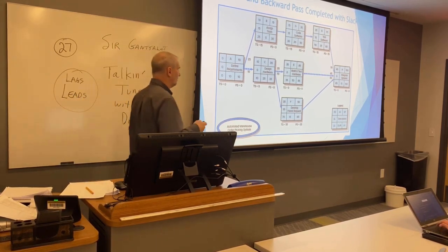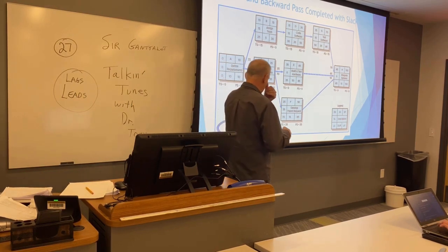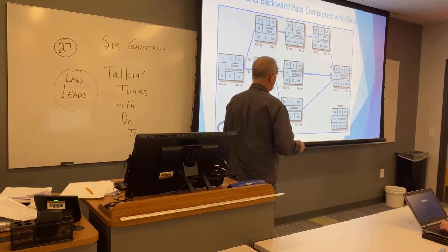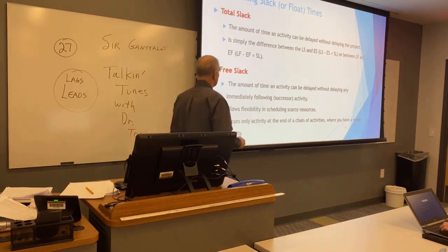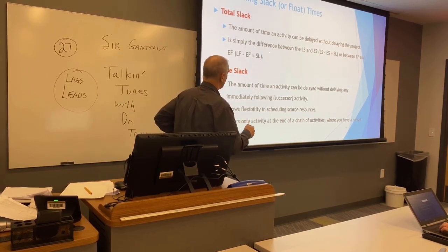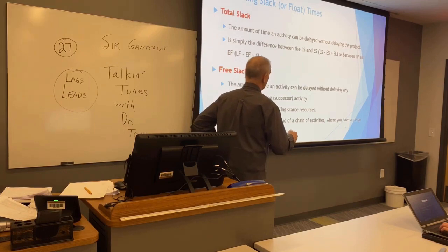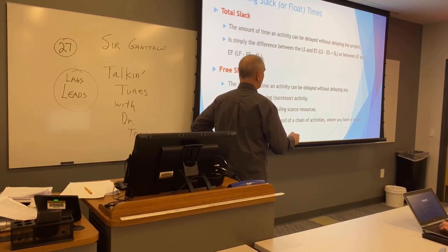So it looks like we're almost done, aren't we? But we're not. We got to calculate the slack time. We're going to do the total slack here and the free slack. But look, the total slack, you could do the difference between the latest start and early start, or you could do the difference between the latest finish and earliest finish.